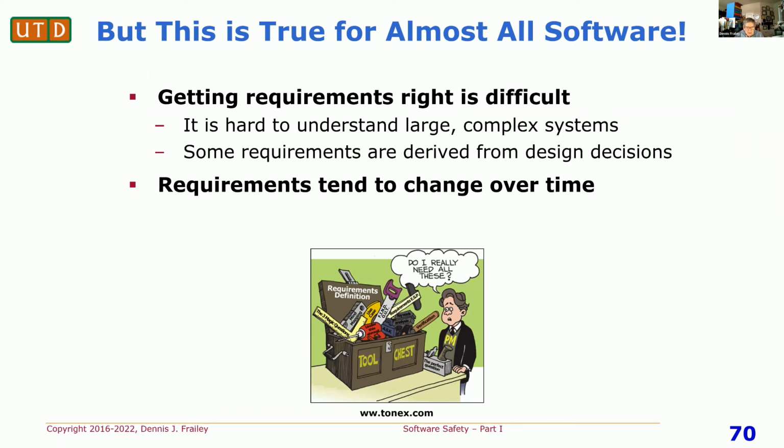There's something called a requirements trace tool, which is complex to set up, but it basically says this requirement leads to these design elements, which leads to these coding elements and so forth. Or these tests that have to be run and this test code and all kinds of these implementation details, this method of installation, all that. And then if you change a requirement, you can then figure out what other things need to change. And that's really important in a safety critical type situation.